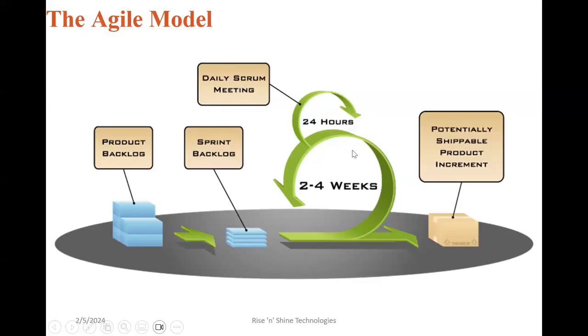So small units of release, 2 to 4 weeks with a target, and every day the revisions. Finally the small units release the product. The objective is the same duration, but now the phases have come up with small durations and everyday reviews.